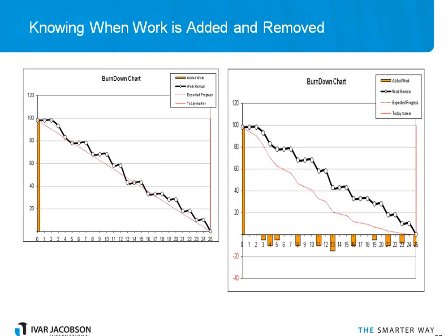The orange bar shows added or removed work. The team on the left has been doing all the work. The team on the right has just been de-scoping whenever life gets a bit hard. So at the end of the iteration, although the burn down shows no work remaining in this iteration, it's because they've actually de-scoped everything. So work can come in or be taken off the list during the iteration.